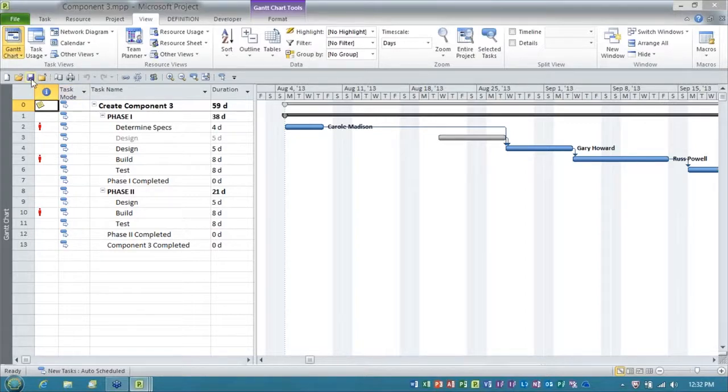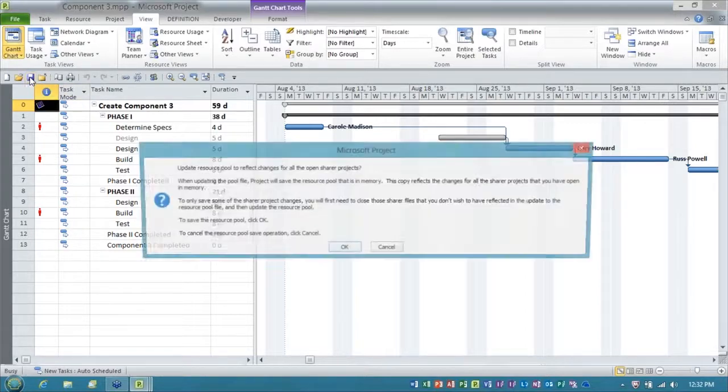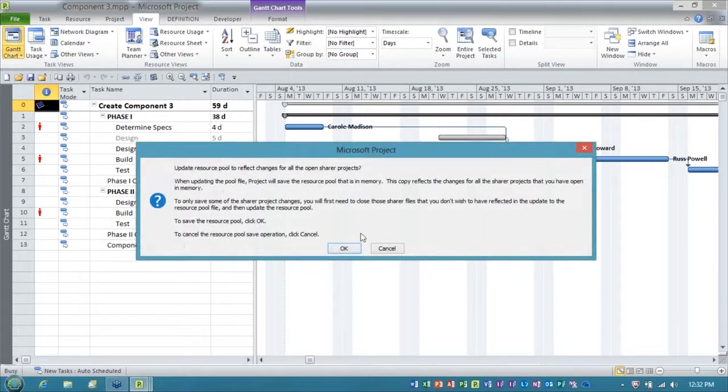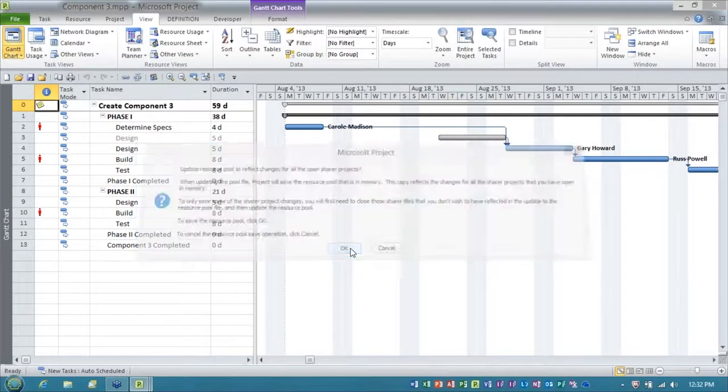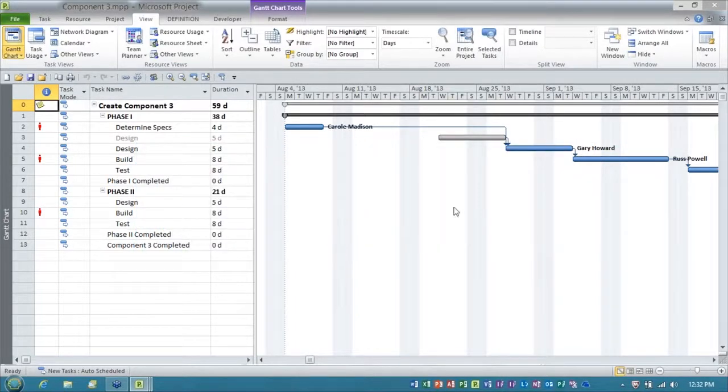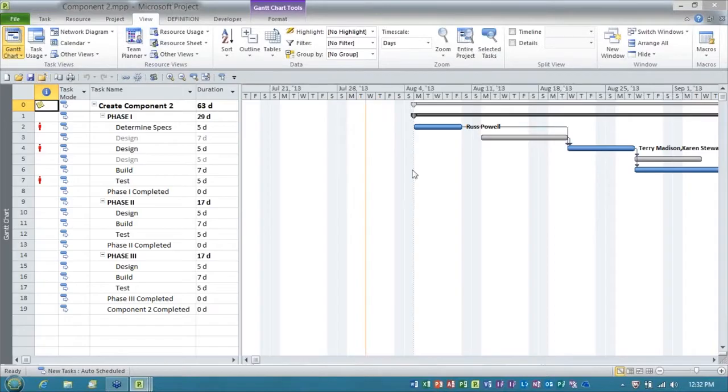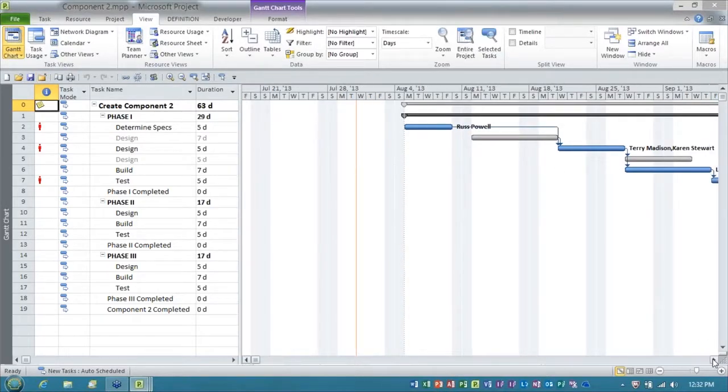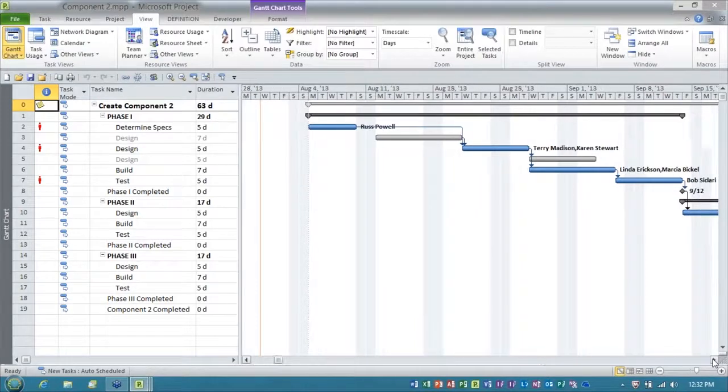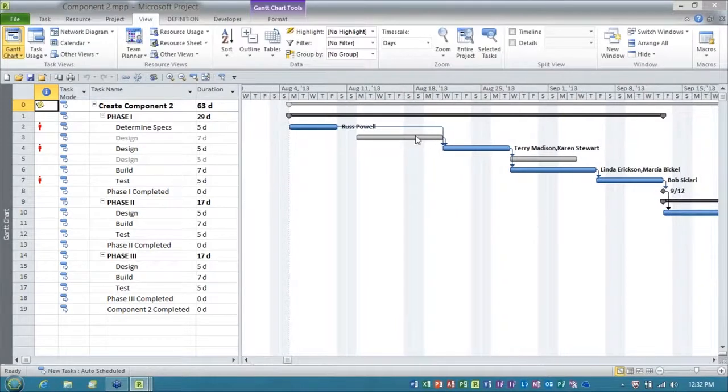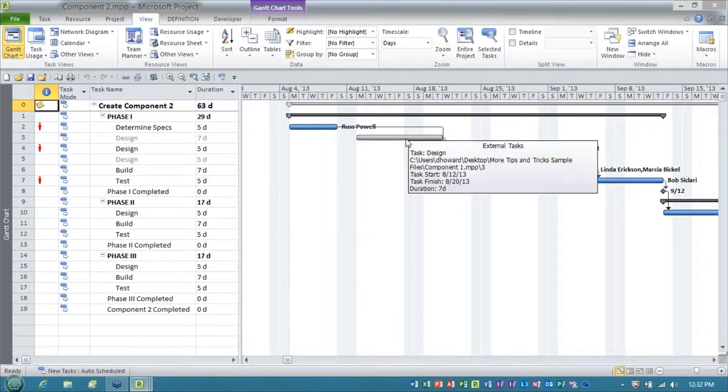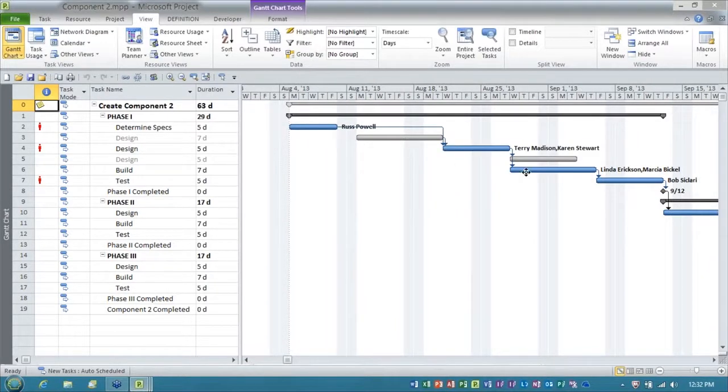Well, folks, I'm going to go ahead and do this. I'm going to save the changes to component three, and I'll close it. And looky here. Here's our component two project. I've got even more external tasks. Look, there's the external predecessor. There's the external successor.